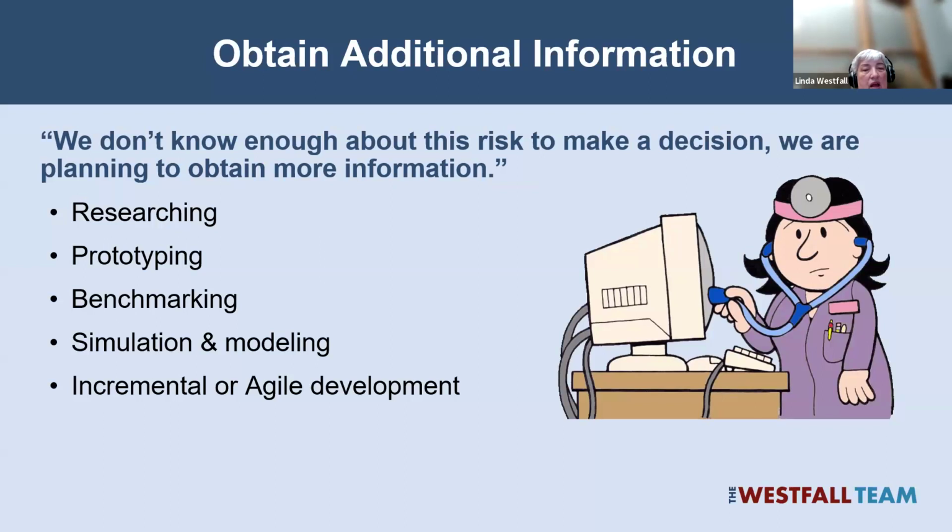For example, if Acme is our subcontractor and the risk is they deliver a low reliability subcomponent for our product, we may do research by performing an audit of their quality management system to determine whether they even have the capacity and capability of producing something at the reliability level we need.